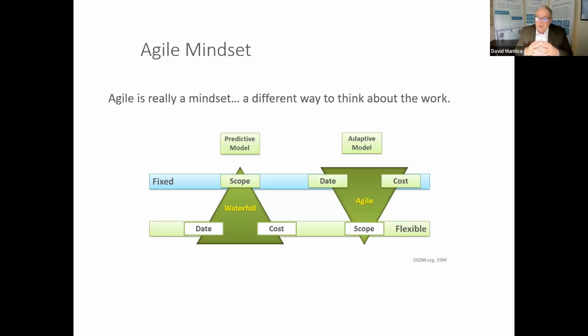In the predictive model, you are locked into your plan, and you might have to adjust your date and your cost. With Agile, you're locked into nothing, and during your work production period, you lock in your date and your cost. That's called a time box in Agile. So your iteration might be 2 weeks, 4 weeks, or 6 weeks.